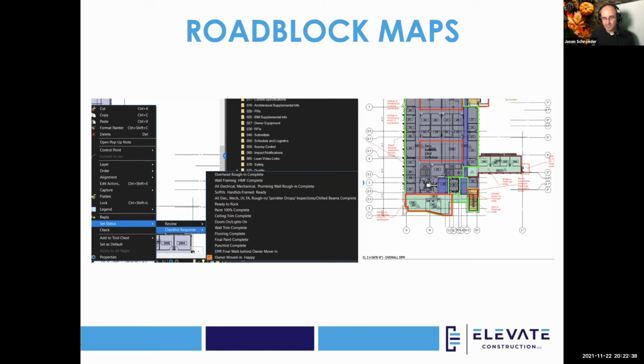You take that red area and you go to a strictly Scrum system. You get that thing done as fast as you can, and you have a separate crew outside of the rhythm focus on it. If you can finish on time, you do. If you can't, you let that owner know. So with Takt, you either eat into a buffer or you detach it from the system.